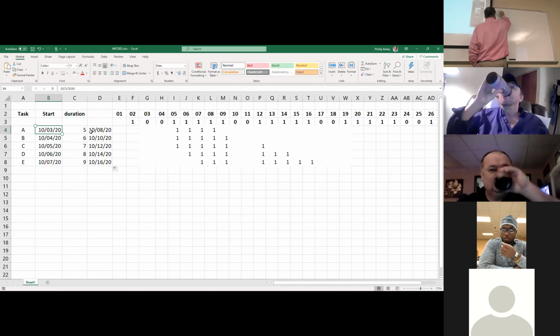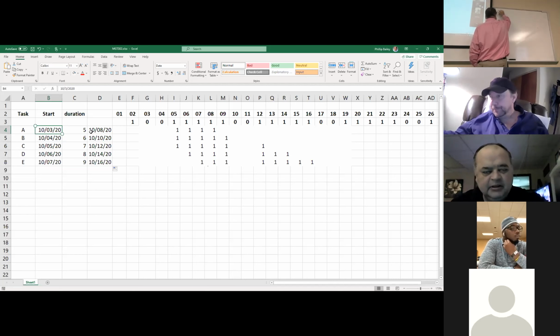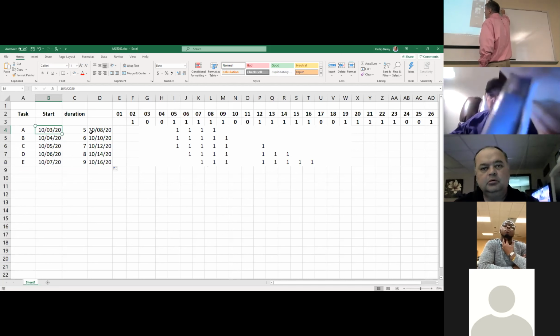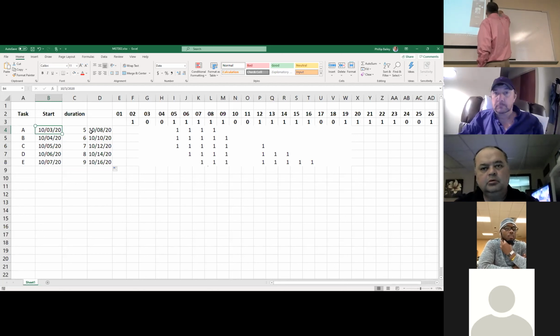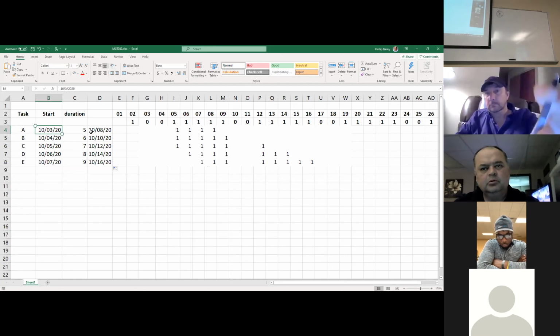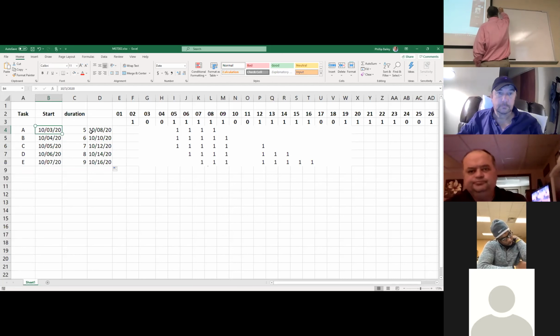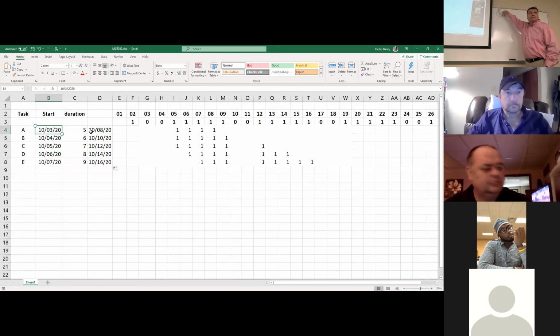So we have A. What's the duration of A? And it can start on day what? Day 0. Right? Start on day 0, and it's going to last 5 days, right? 5 days. So now we got 0 and 5. So if we're starting on October 3rd, that's an arbitrary assignment. That's just the date we picked. Okay, customer says, I want to start October 3rd. All right, so you pick October 3rd. So this is 10/3/20. Once you know that date, you should be able to calculate this date, the end date.